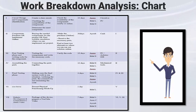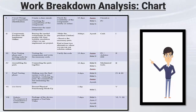Here comes the breakdown analysis of the device, which describes the main steps the team has taken in order to achieve their goals. It includes seven main activities with their full description, duration, people in charge of achieving it, and resources used. For example, concerning activity number seven, which is aesthetic development and comprehensive video of the device, taken by the four members and planned to be done in seven days. During this step, we packaged the device and prepared the video that will be uploaded on YouTube.